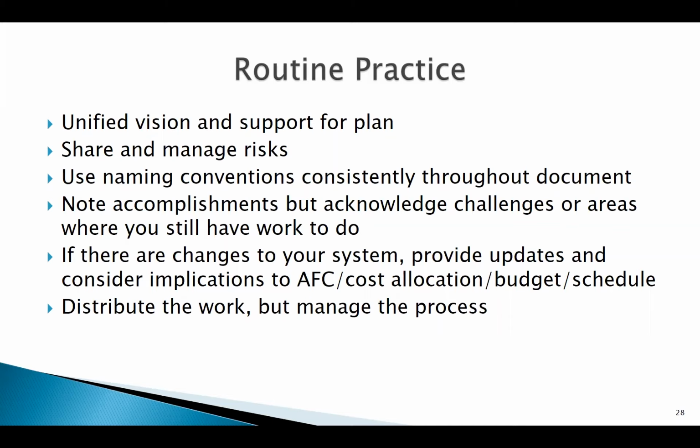When we see those kinds of things, it provides comfort to the Children's Bureau because, A, we see you have an understanding of what the risks are on your project, and B, that you're being honest with Children's Bureau about what they are. And then also you have a plan for managing them. We get worried when we see APDs that don't talk about any risks or challenges. If we get an APD that says everything is wonderful, we look at that and say, is that a CCWIS project? I mean, we expect that there will be issues.